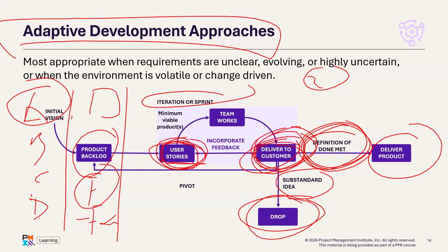We're supposed to do the second one, B. But because of this value, let's rearrange it. Instead of B, work on C first, then D before B. We call it backlog prioritization or reprioritization. That is also possible. So the customer will come and reprioritize the backlog, or even introduce new features, or remove existing features based on what has been delivered.